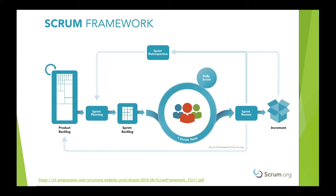The team pulls items from the top of the backlog into a sprint during sprint planning, which results in a detailed plan called the sprint backlog. The sprint backlog is created based on the team's historical velocity, which represents the rate at which they produce value. As the team executes the sprint, they meet daily at the daily scrum to discuss what was done the previous day, address blockers, adjust the plan, and determine what will be done the following day.